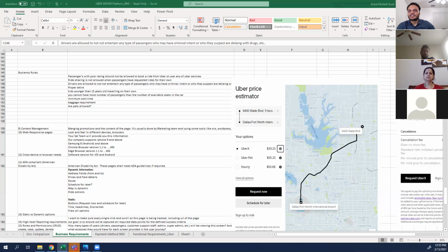Right? What was the difference? Accurate. One was waterfall and one was agile. Waterfall was that Shrey can start his work only and only after I've completed my work, and likewise other people can start their work after that. So it was a phased approach. There are 6 different phases. It goes in 6 different times, like 2 months, 2 months, 2 months, 2 months, 2 months, 2 months.